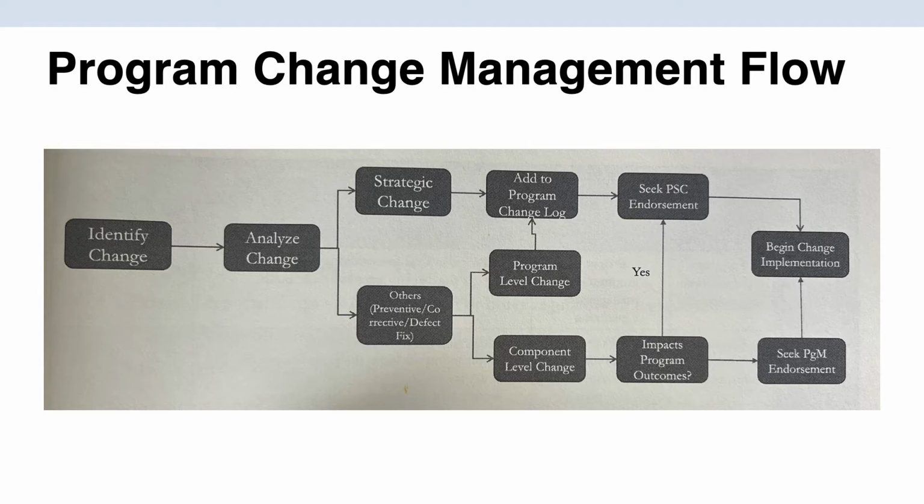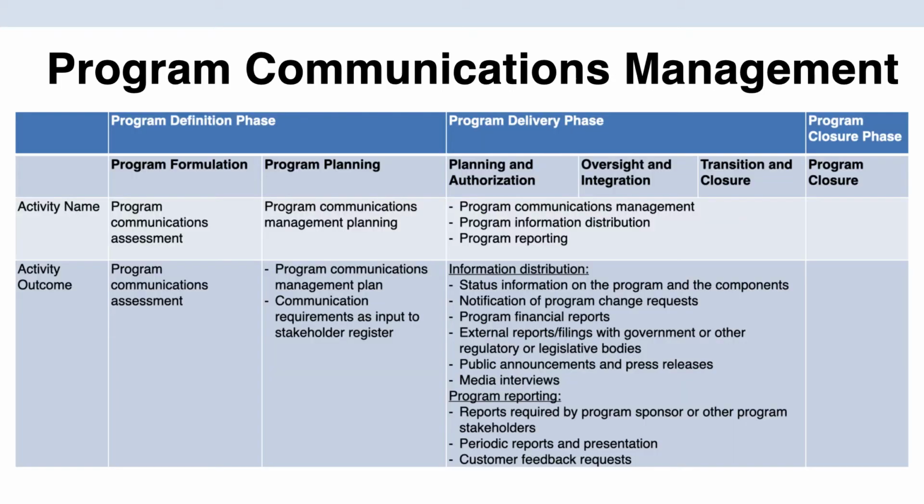Here is a look at the program change management flow. Feel free to pause this video to have a closer look. We will identify the change, analyze it, and then plan out what we're going to do with that change, make sure that we add it to the program change log, and seek approval before we actually implement this change.